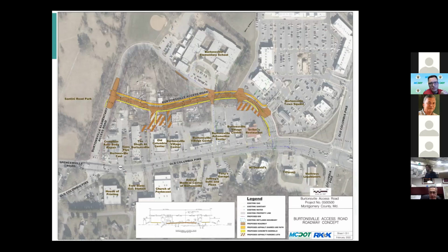Hi, everyone. I appreciate everybody's thoughtful input here tonight. I just wanted to clarify a little bit what Michael was saying about contacting the property owners. He's specifically referring to negotiations with them over the acquisition of the property, because until we have those final plats, you really can't tell a property owner the number of square feet, and thus arrive at a value that we want to offer them.